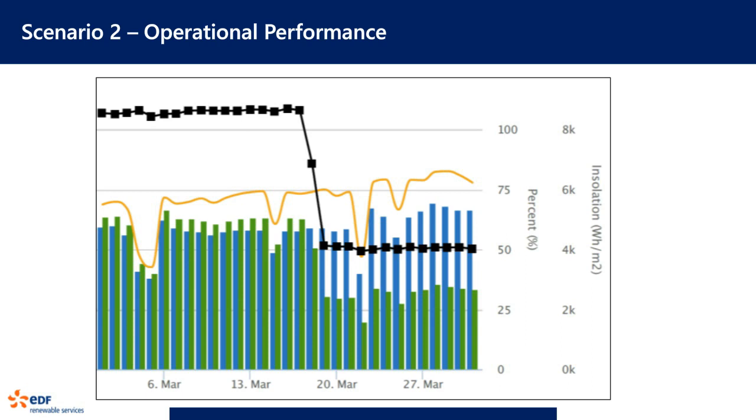Unfortunately, we actually saw the problem happening in real time and were notified by our operational team. But then going back, we discovered that this was a unique situation and a low failure rate item that the owner of the project had chosen not to keep in stock. And really that would be pretty common. As you're thinking about how to best mitigate issues in your plant, you certainly can't have, quote unquote, a whole other plant sitting on the shelf, right? So you have to look at key spares. And in this case, it was simply a low probability event that caused this.